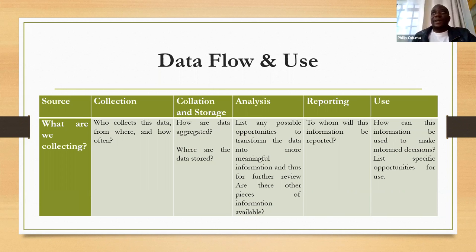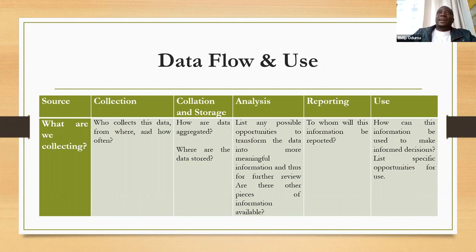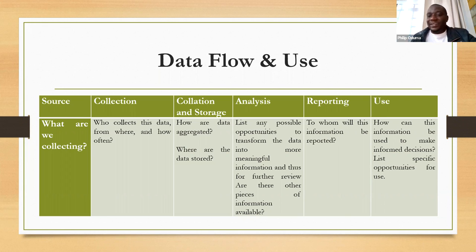For monitoring, since it's a continual activity, it depends from project to project and how you'd like to collect data. These are tools we develop as a project — it could be just a basic table, for instance number of activity, number of people reached, male, female. This table should help you towards achieving the various indicators and deliverables. For each and every project, you normally come up with a tool, because what you're monitoring is the indicators. For evaluation, because we are collecting data at baseline, midterm, and end line, we mostly use questionnaires and surveys. For quantitative data, you can also use research — looking at numbers from past organizations that implemented. So the tools are questionnaires, surveys, and research data.